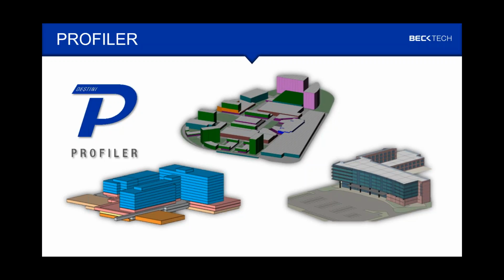The second thing, we have geometry, we have shapes, we have areas, we have volumes. So from this, we can start to apply our historical rules of thumb based on the areas of the slabs or the departments. We can start to have conversations around assumptions around skin and materials. And ultimately, we can come up with a high-level number, but be able to back it up through conversation and verification with the design and the owner's teams.